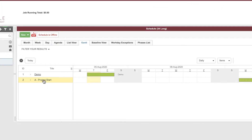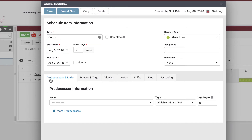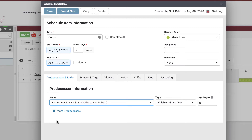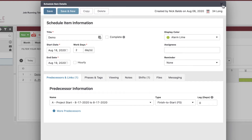Here's the beauty — and I encourage you to follow this rule: every schedule item should be dependent on that start item or another item that is dependent. What do I mean by dependent? We have predecessors. I have my demo item right now tagged as a fixed date, but I'm going to use predecessors to say that demo is actually dependent on the start of the project. As you see, it pushes the dates.